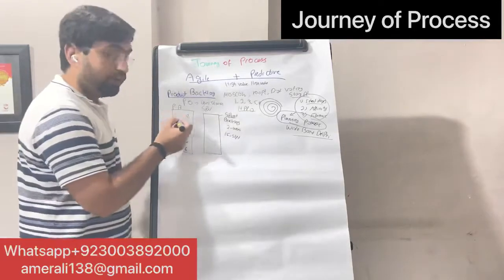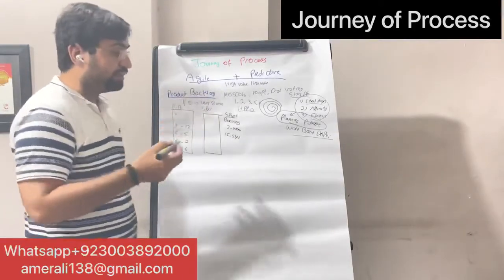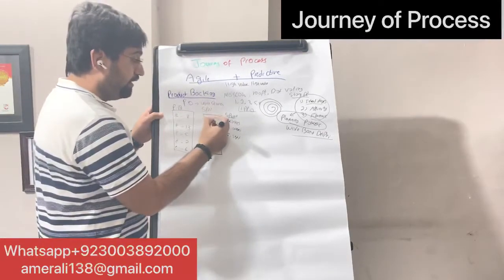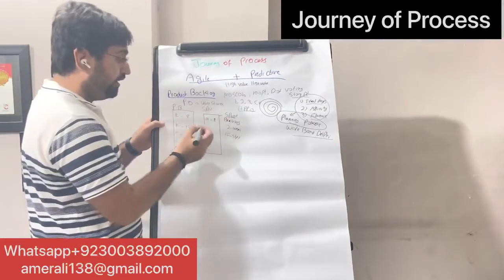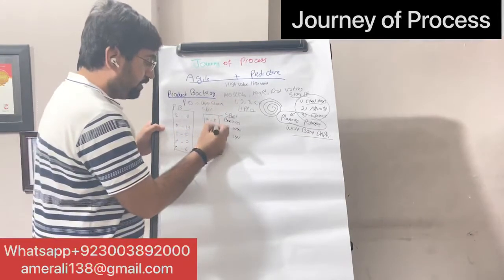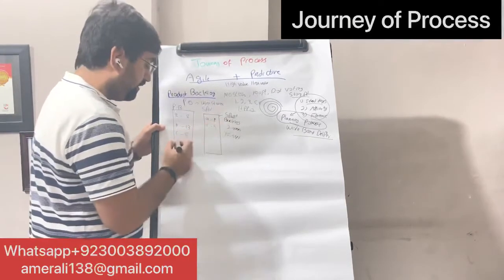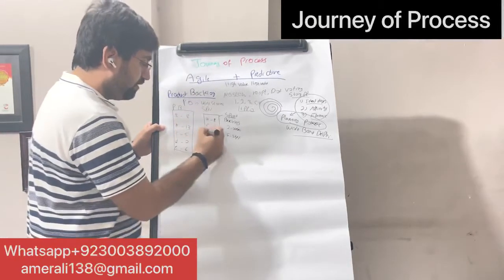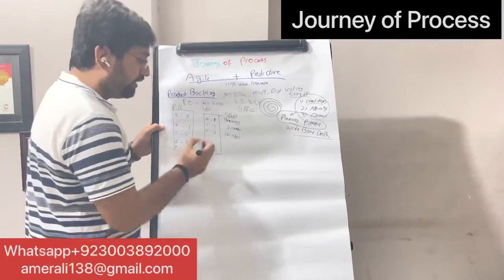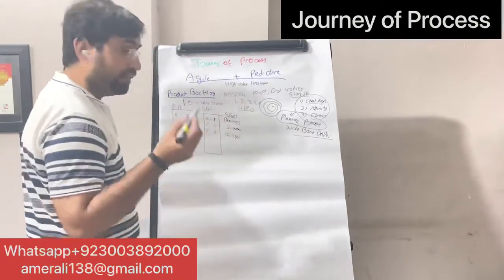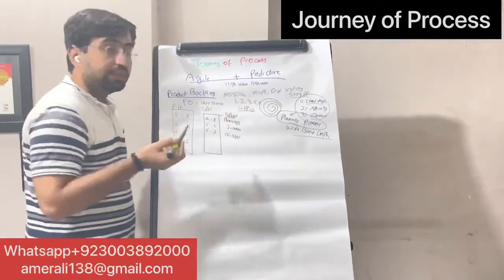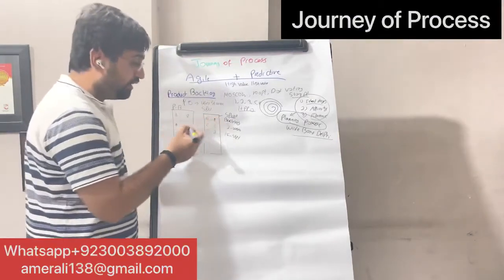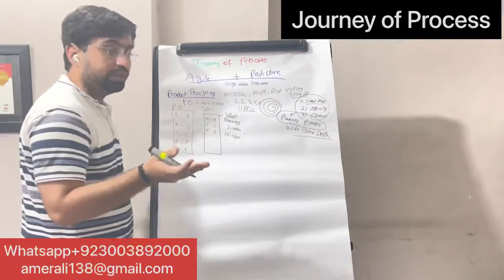Now this is arranged as high value, high risk. They said we can take 15 story points, so we will take A, that is 8 story points. We cannot take B, we will take C. 8 plus 5 is 13, so we can take D. We cannot take E because we already have 15 story points. Although B is a high value, high risk item, A is number one, so it goes there. We cannot take more story points, so we'll leave it here.